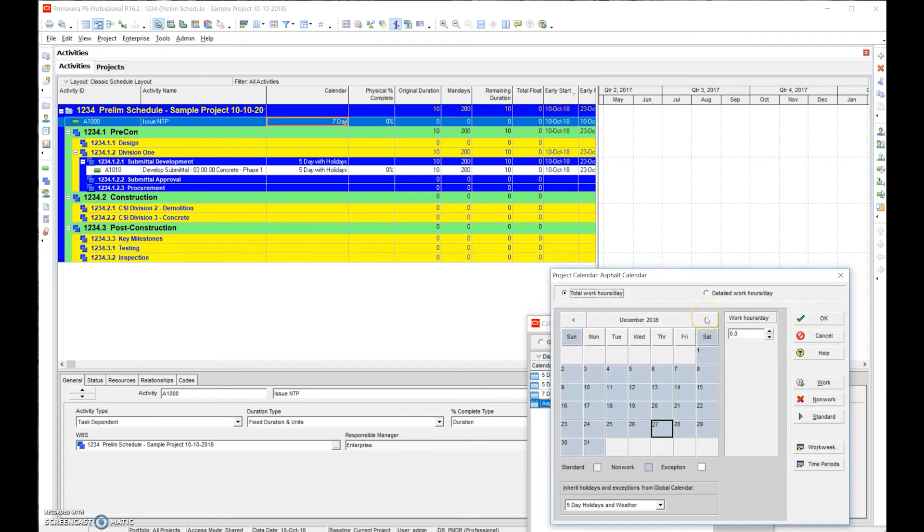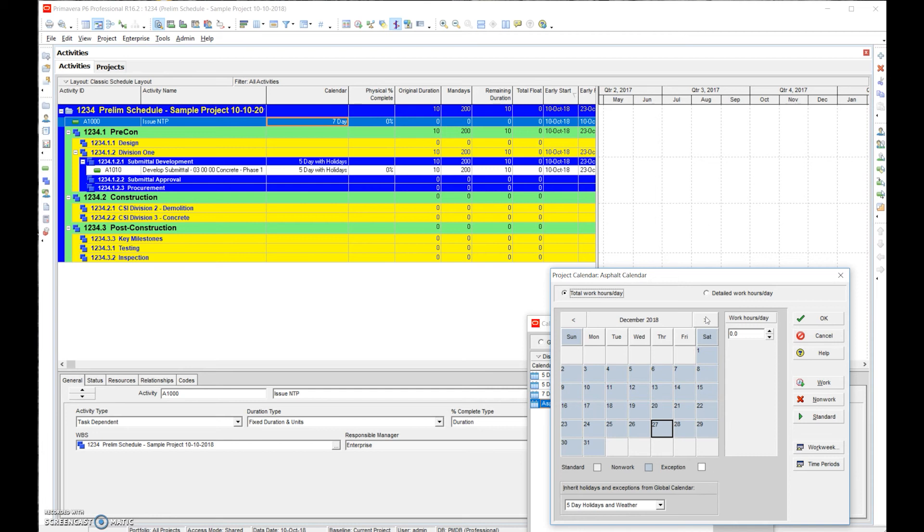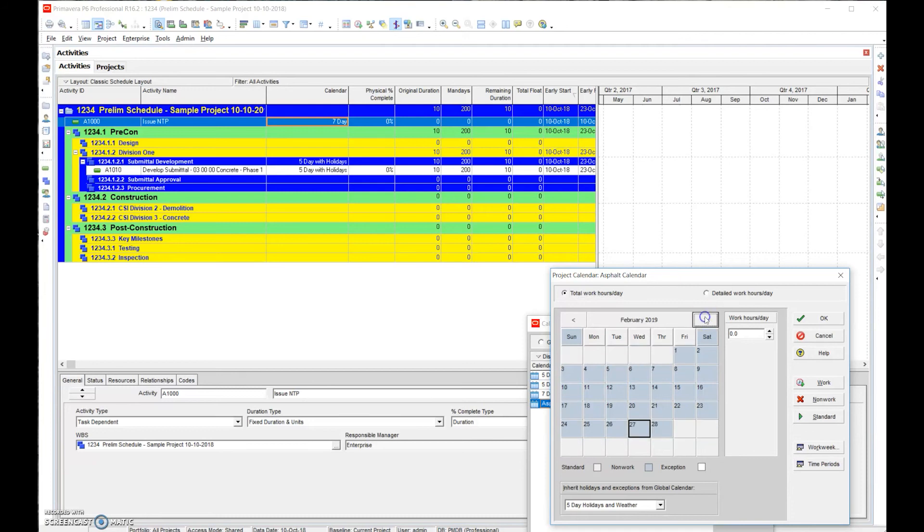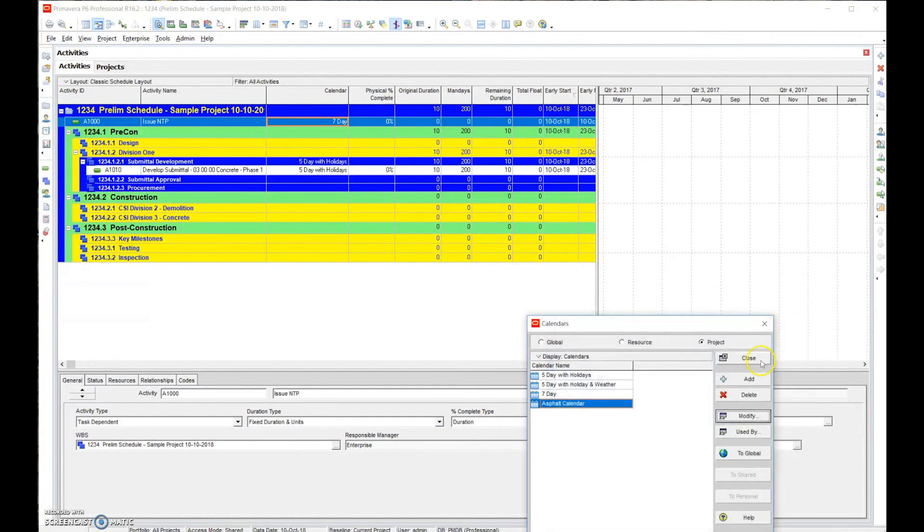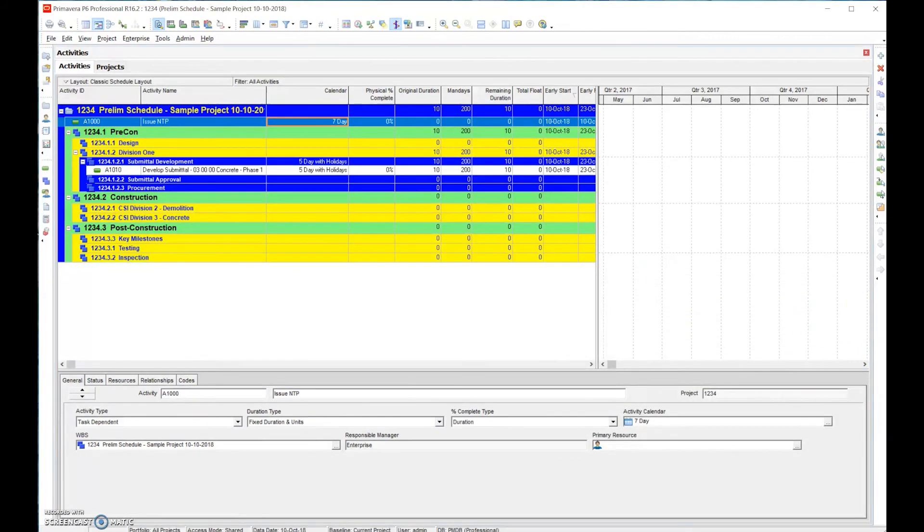We end up looking kind of like an idiot. If we see the asphalt calendar, well we know even if we did the baseline schedule and we had asphalt taking place in May, things happen and the project schedule pushes. We want to design the schedule with logic and availability so if the schedule pushes, we're able to prevent things like trying to asphalt in January or February.